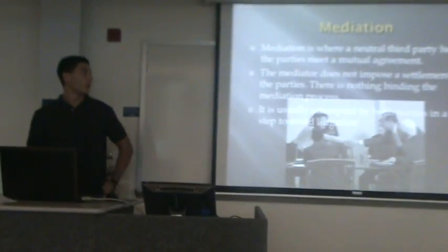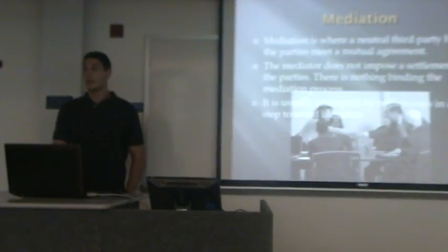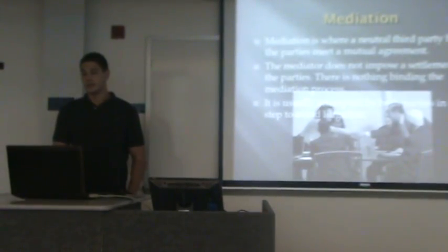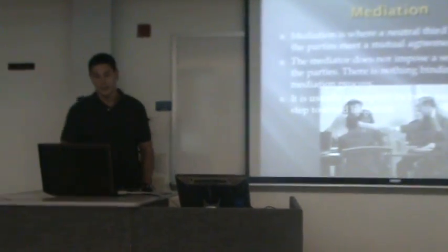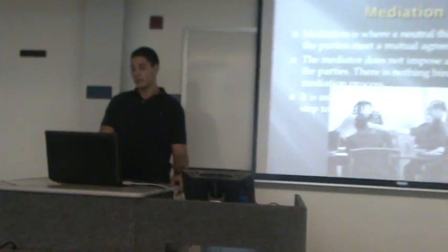Mediation is where a neutral third party helps the parties reach a mutual agreement. The mediator does not impose a settlement on either party. There is nothing binding in the mediation process. It is usually the last step people take before they begin litigation.